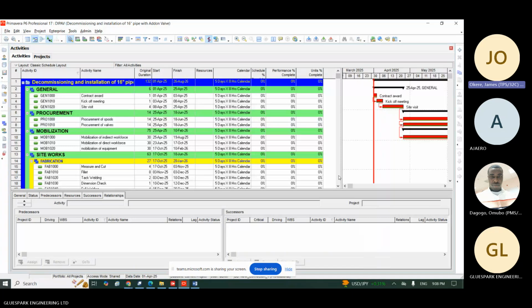Currently in Nigeria today, a mason will be asked to lay at least 75 blocks a day. So that 75 blocks can be used as a benchmark. A mason can lay a minimum of 75.